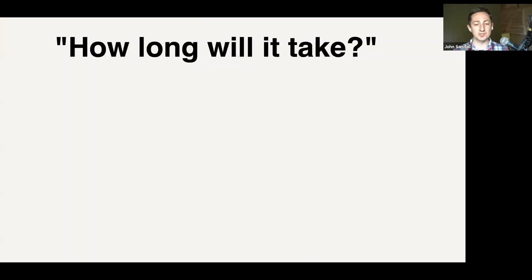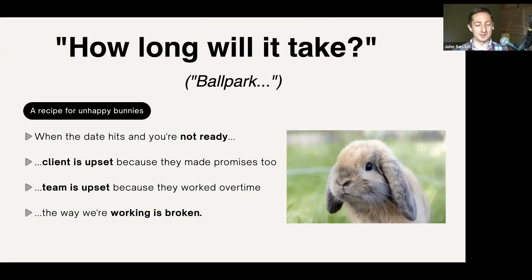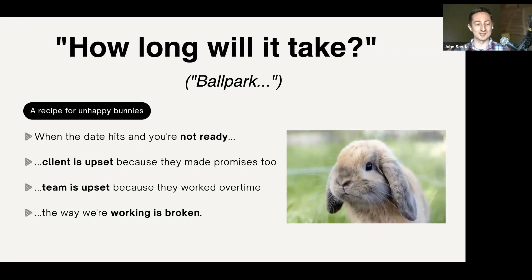So, motivations. One of my least favorite questions as a consultant is when a client says, 'How long is this thing going to take?' Because this is a recipe for unhappy bunnies. The date comes along, we're not ready, the client's upset because they've made promises, and my team is upset because they've worked overtime. The way we're working just isn't working. Can't we just get better at estimating? People are bad at estimating — for example, the Sydney Opera House was estimated to take four years and $7 million, and it took 14 years and $100 million.